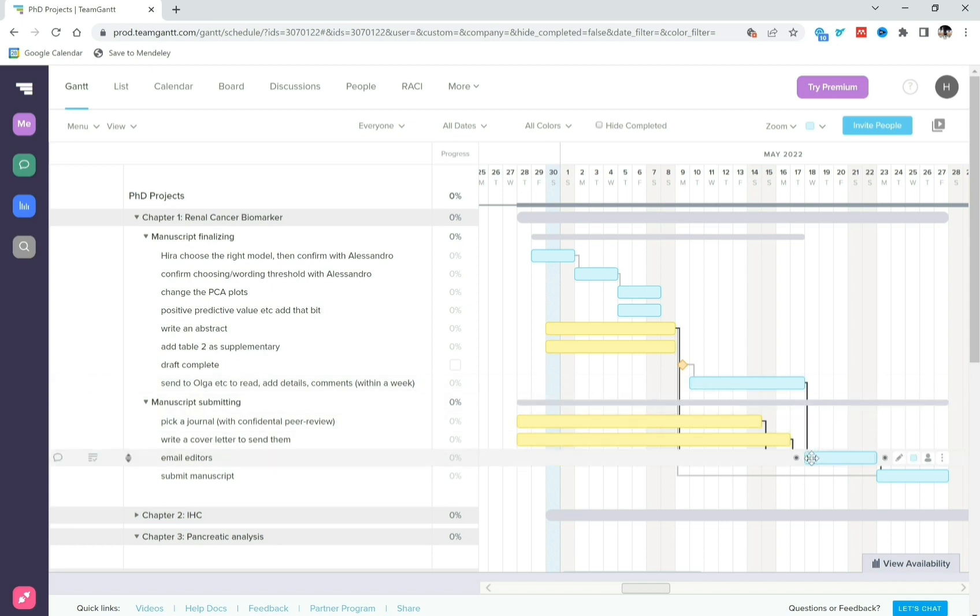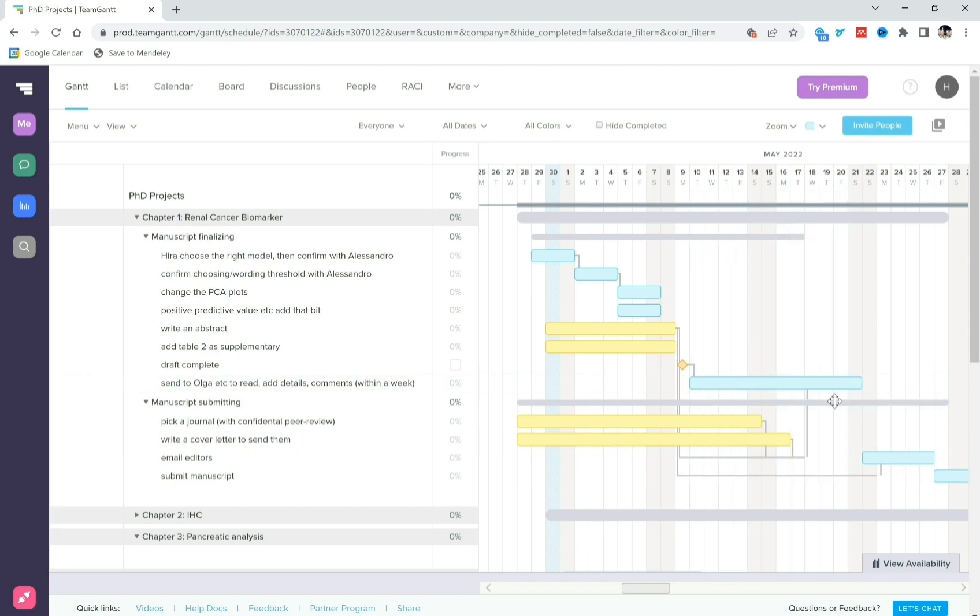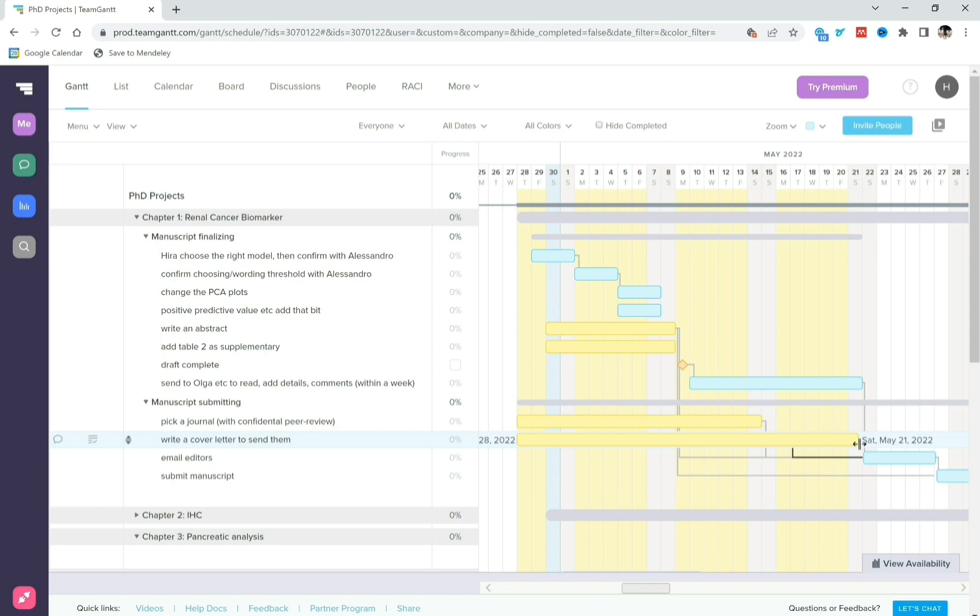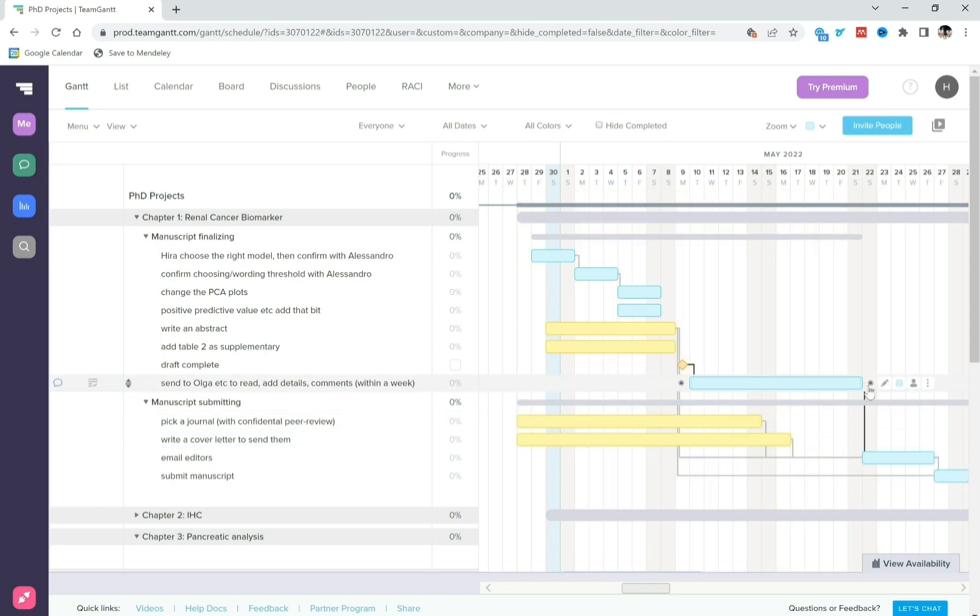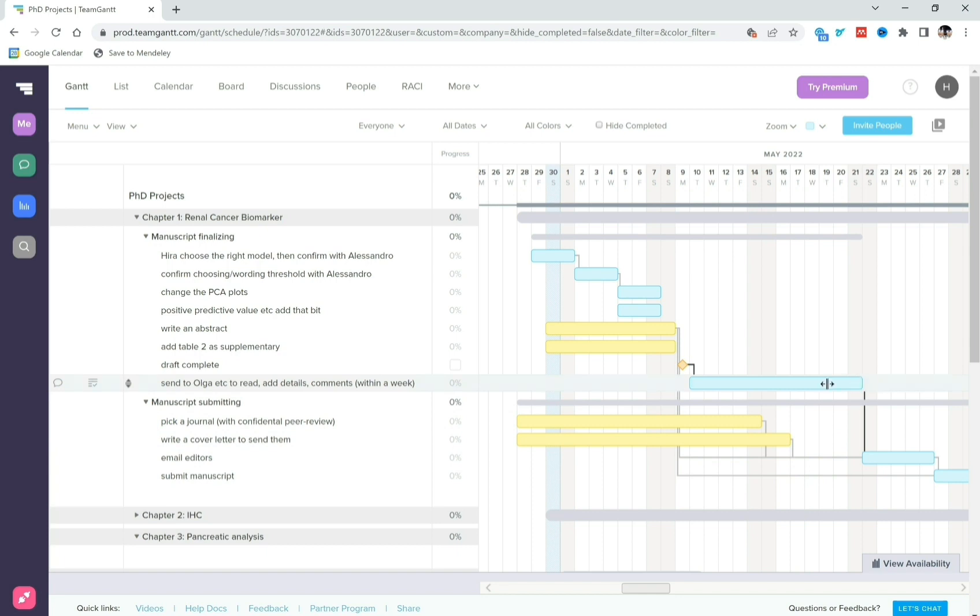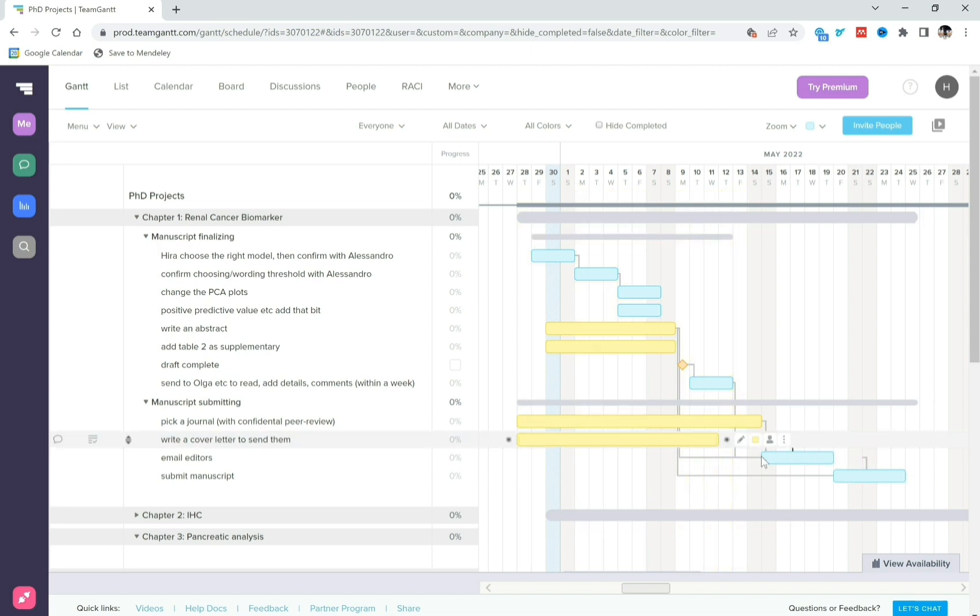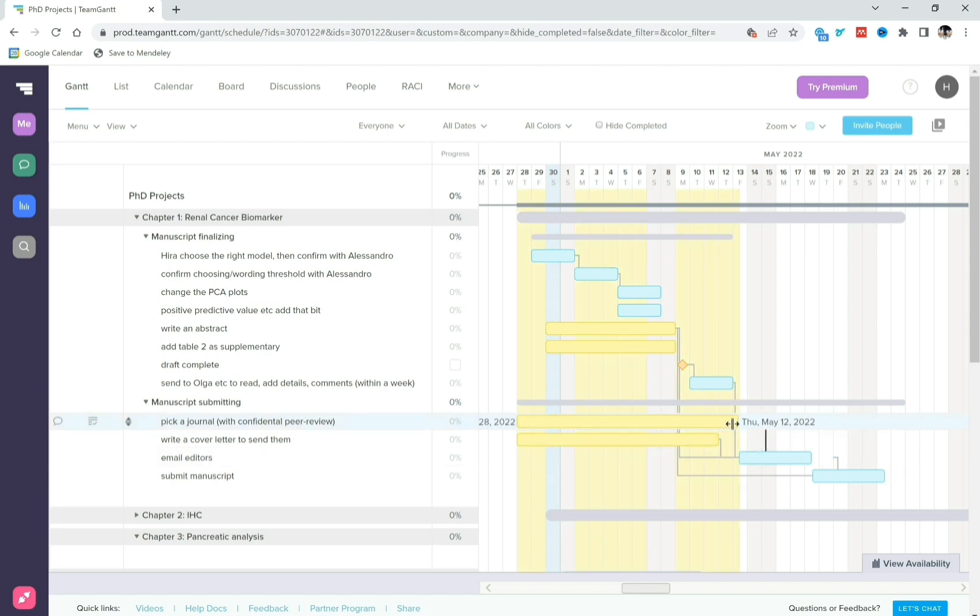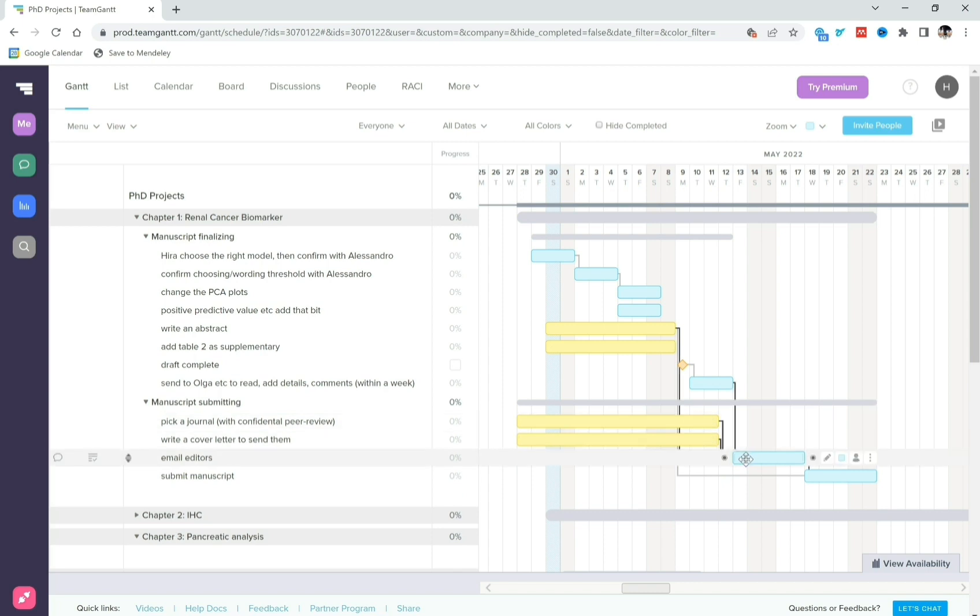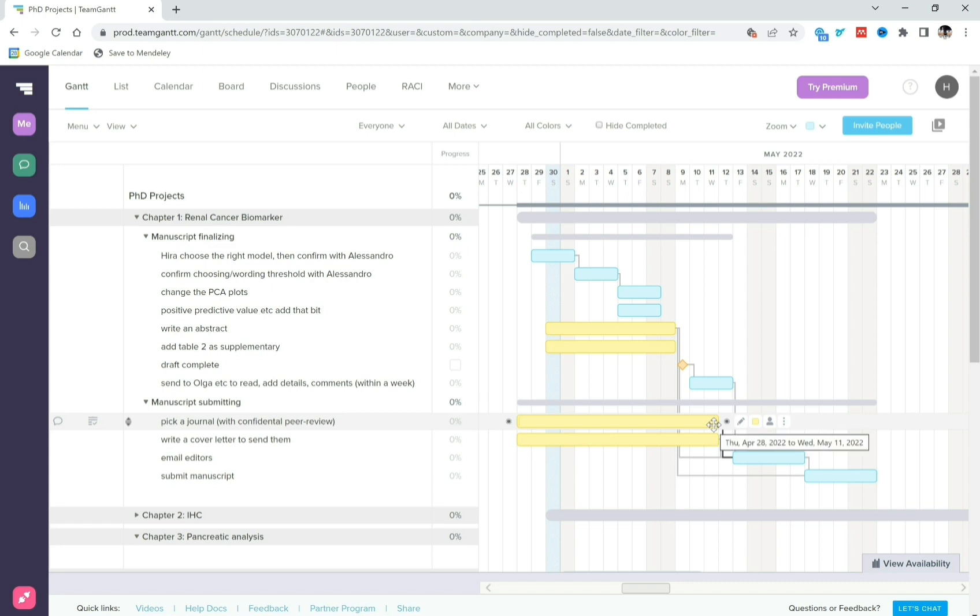The other thing is I can also link it to, for example, over here I know that this task is directly linked to the next one. So for example if they take longer then I can take longer to write my manuscript without actually pushing my end date back, whereas if they get to me really soon then this is going to end up being the blockage and I'm the one doing this. So I need to actually do this quicker so that we can push this back. And this task is also something I need to do, so I need to pull it back and do it quicker because that is now what is called a limiting factor, you know, kind of like we have in chemistry equations where you've got a limiting factor and that's what's actually causing the little difficulty.